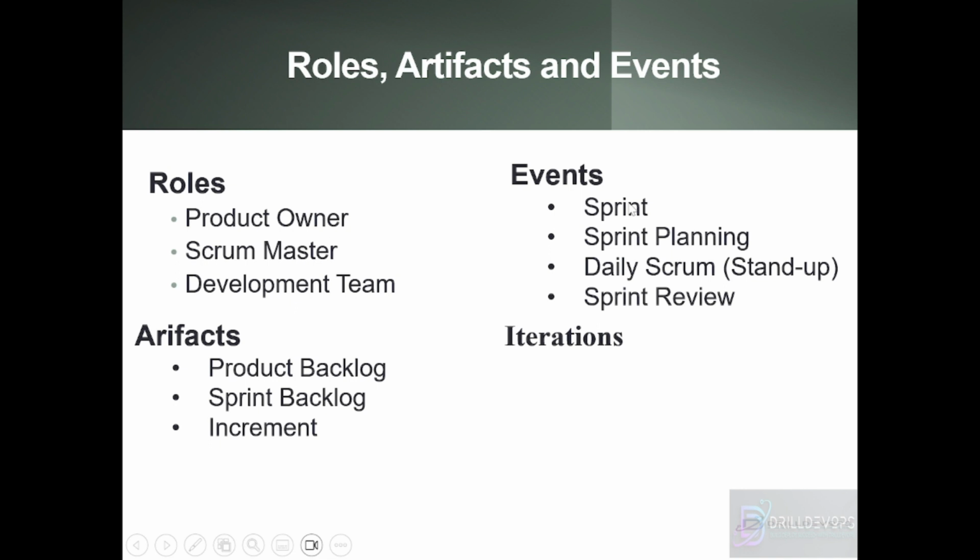Daily Scrum is something that happens on a daily basis for 5 minutes to 10 minutes or 15 minutes based on the team. Everyone will come forward and talk about what they have worked on from yesterday till that stand-up call, if there are any blockers, or if there is any help needed, they will ask someone and connect offline, not in the stand-up but offline. Or if there is any important discussion or something related to production issues, they'll discuss it on the stand-up daily scrum call.